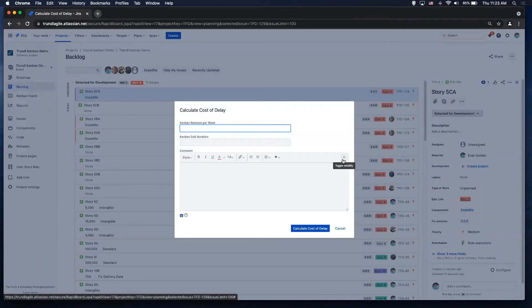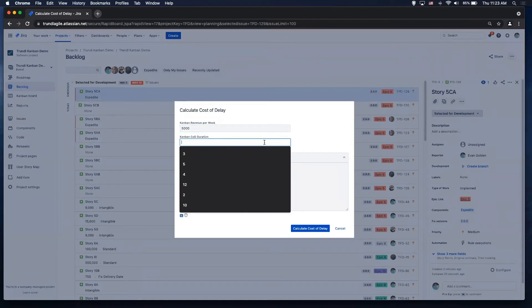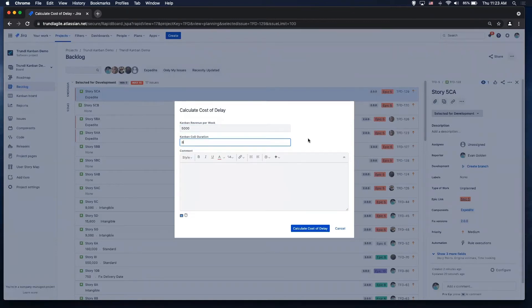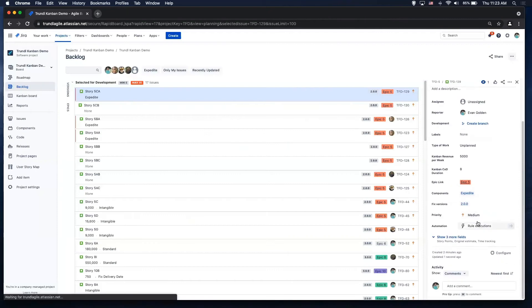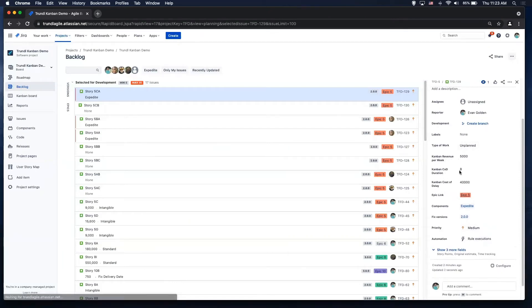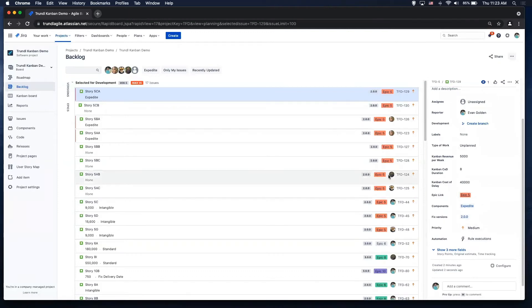So what's that revenue per week that we would lose? Let's say it's $5,000. What's our cost of delay duration in weeks? We'll say eight. And then if I calculate it, you'll see it's going to add the revenue per week, the cost of delay duration, and it does the math for you and it gives you that $40,000. So you get to be able to visualize that right there.